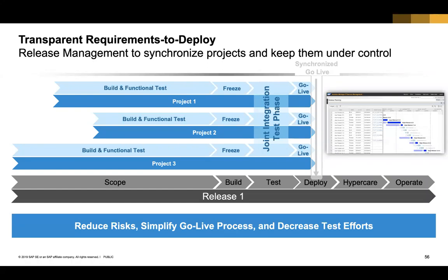And that's the idea of the release management, which we will see in detail as we go along. But right now, it's important to understand that Focus Build expects you to follow a release calendar, define a release date, and then everything that you do within the build is preparing you for that release. So all work packages will be assigned to a release, all work items will be assigned to a release eventually, and then they'll all be part of a release so that they will all go live, so that the solution manager knows what all is being done for this particular release.